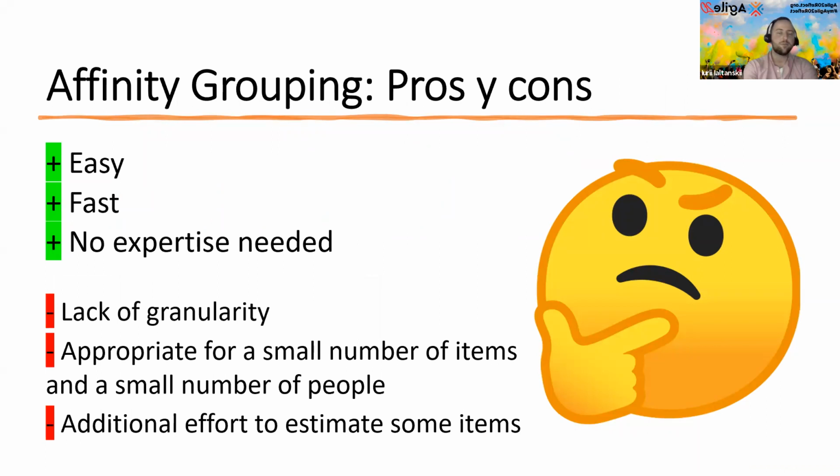Was it your question, or would you like to know something else? Oh, so anybody can make an estimate, but only a few people can make an accurate estimate, right? That's right. That's the problem, because it's relative. The only way to solve this is to run experiments until you're accurate in your estimates, and it requires time. It's absolutely impossible to have accurate estimates in the first 3 to 5 sprints in a brand new team. It's almost impossible.